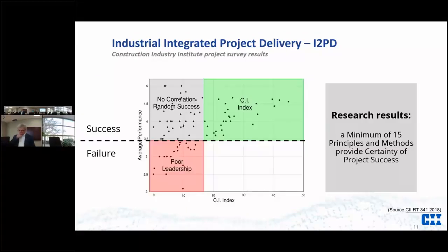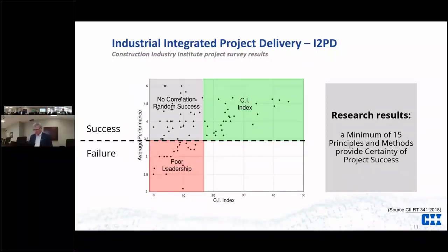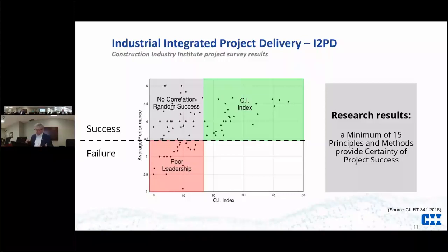Another way to look at the same data: when you're below a certain level — below 15 on the CI index — you see random success or failure. For the successful projects in that range, we couldn't find a reason they were successful. There was a slight correlation with poor leadership and project failure. The good news: what we found in the research is that a minimum of 15 of the principles and methods used at the right intensity level puts you up in that green CI zone. That was the core of the research.